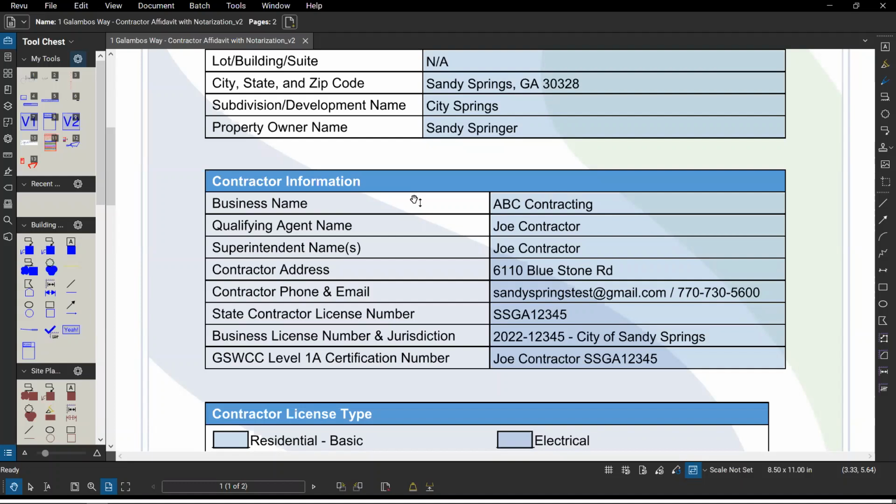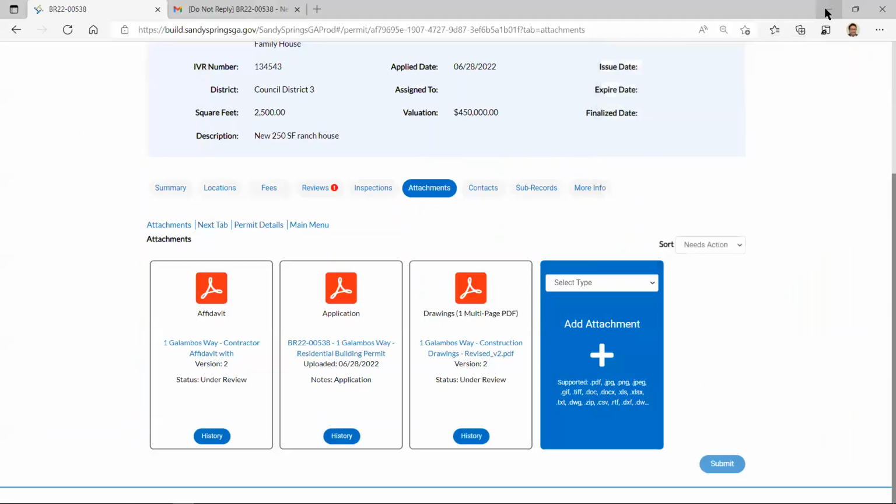But I'll caution you though, an expediter a lot of times will do this, for example. The expediter is the one who gets all the drawings from the design team, and they'll actually upload everything for everybody. But if you want your architect to do it, they can. For some of our larger projects that are just kicking off, maybe they haven't selected a contractor yet, the architect may be the person that does that, and then later on it'll transition to the general contractor.